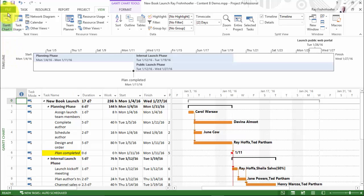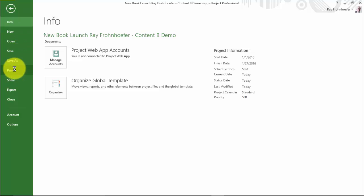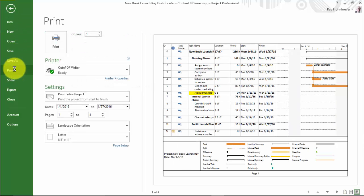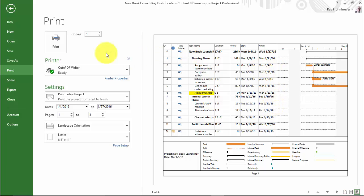So I'm going to go to the backstage view file, print, and notice it stops at finish. I have a little piece of the next column exposed, but you have to have the entire column exposed for it to appear as part of the print.